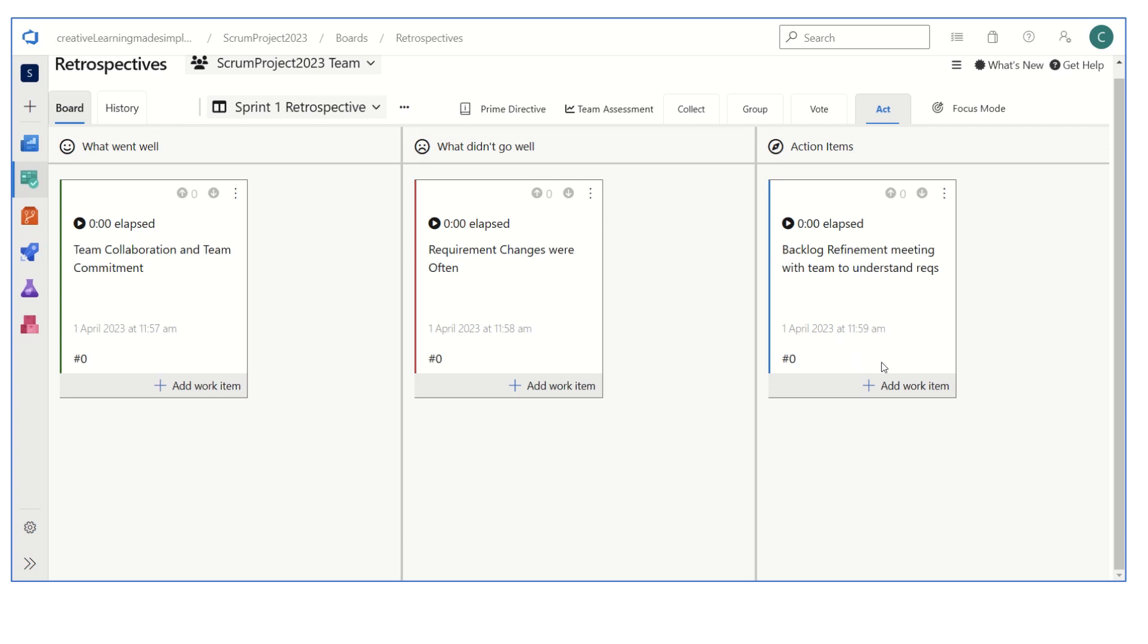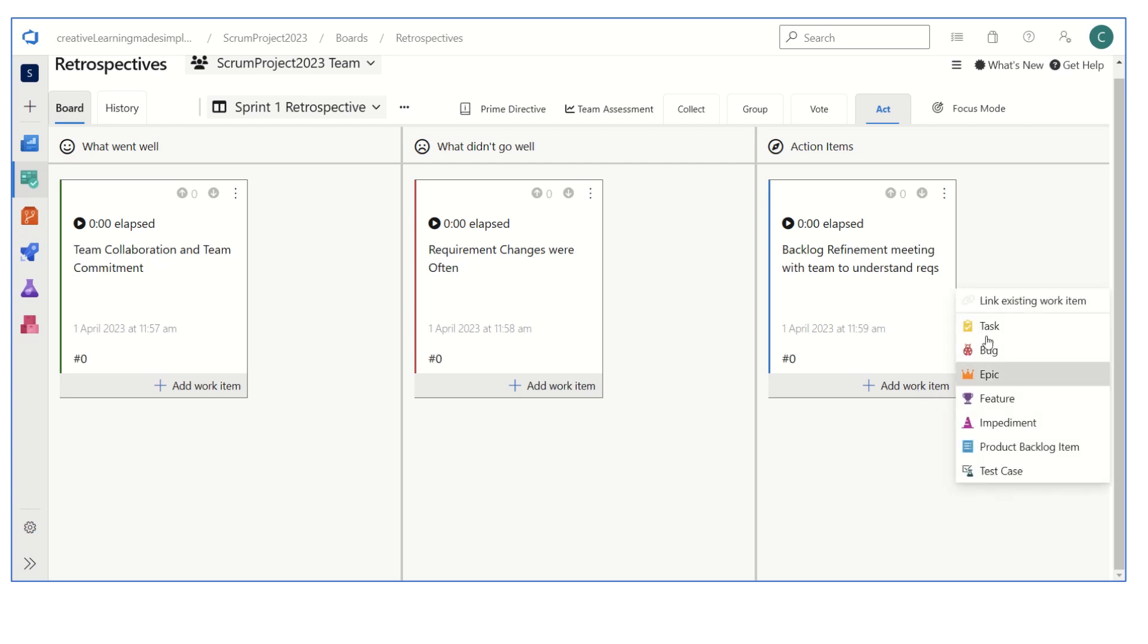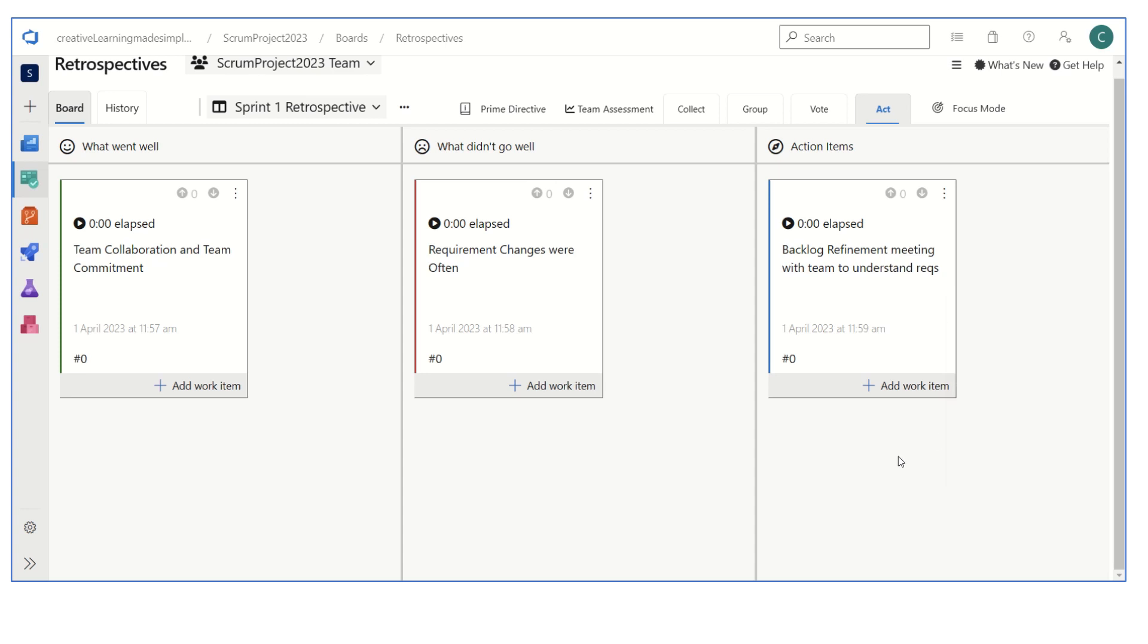If we see this particular column, from here we can also add a particular action. There is a backlog refinement meeting with team to understand requirements. If you want to capture this action in our backlog, we can add it from here. We can create a task, we can create a corresponding story if there are any action items that need to be taken care.